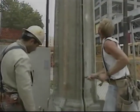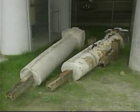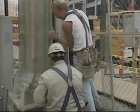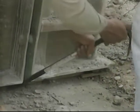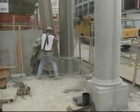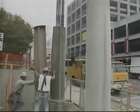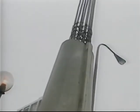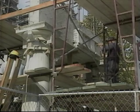Down the hillside, the archway project was in progress. The original columns of the 1909 archway had become so unstable that their reuse was deemed unsafe. New columns were made, but the team made exact replicas of the original columns by creating a fiberglass mold from those columns and pouring concrete into the molds. When the molds are stripped away, the new column is left in place. Now the original precast concrete portions of the arch can be added to these columns, thus recreating the Angel's Flight arch.